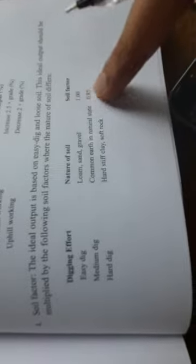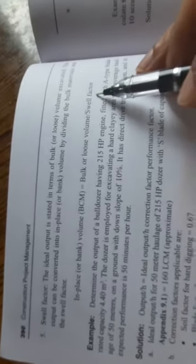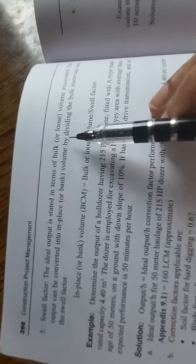You have this kind of soil factors you have to add. And lastly, the swelling factor is given by the bank cubic meter, bulk or loose volume, divided by the swell factor that is given for the soil.